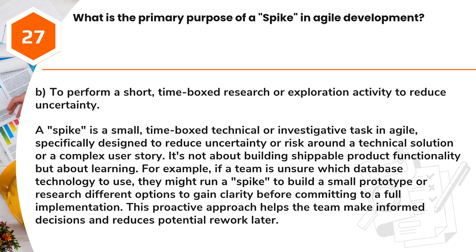For example, if a team is unsure which database technology to use, they might run a spike to build a small prototype or research different options to gain clarity before committing to a full implementation. This proactive approach helps the team make informed decisions and reduces potential rework later.